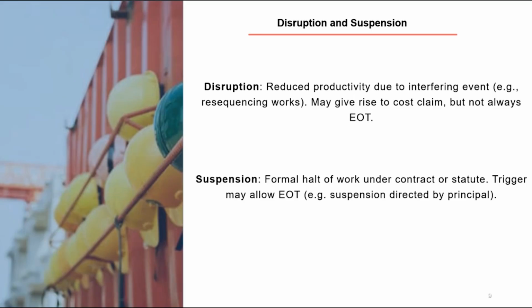And that meant that they had to work in and around and over other subcontractors, so painters, plasterers and plumbers, electricians are all working perhaps in very common areas, and that led to a lot of increased costs for the subcontractors. And their claim was more for a disruption rather than a particular delay, because there wasn't an extension of the works, there was a disruption of the works.